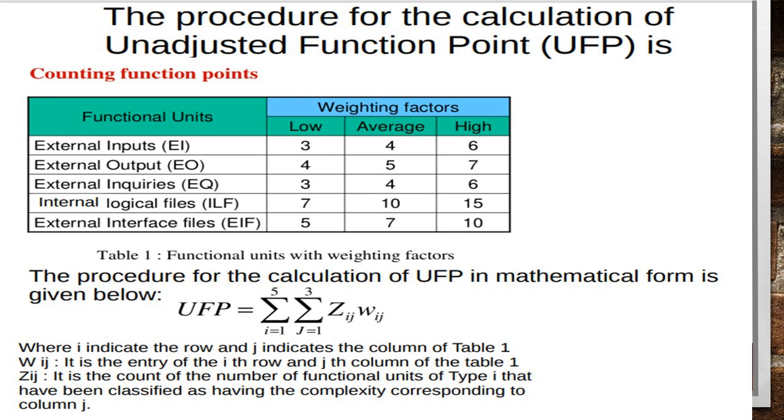Complexity adjustment factor is based on 14 different factors like reusable code, complexity of code, critical nature, etc. A sample value of complexity adjustment factor is 1.2.